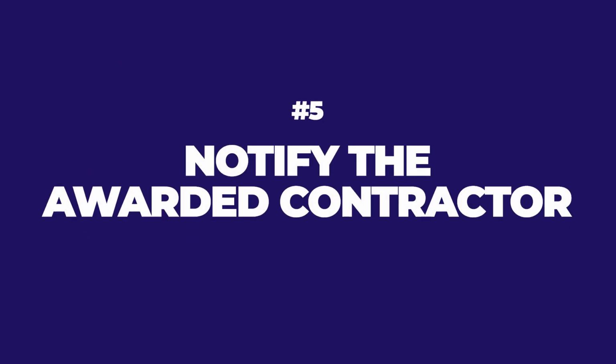Like we talked about in these other videos, you have got to evaluate it based on, if you're going to do cost, that's fine, cost, but qualifications, experience, team, and other criteria, like we've talked about before, because if you only select the lowest bid, not only are you going to pay for that in change orders, but you are incentivizing the contractor to spend the least amount of time with the least qualified people with the least amount of effort on your project site, because ultimately they're running a business and they have to make sure that they are whole.